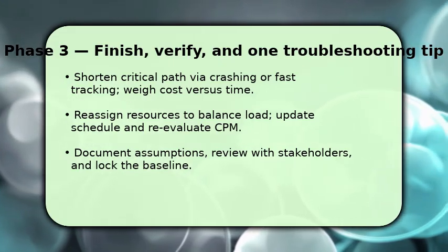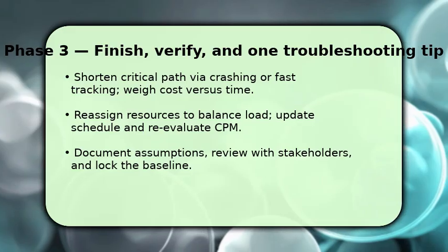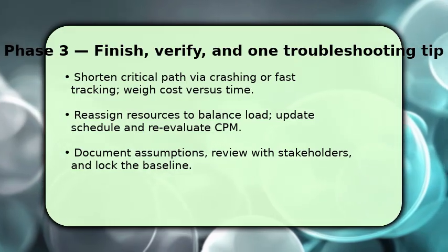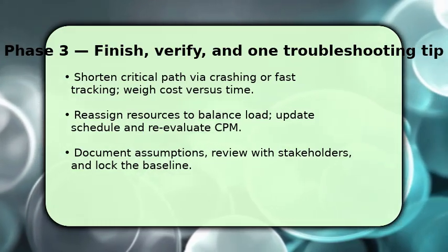Troubleshooting tip: if results look unstable, check for input errors. Wrong dependencies or mixed time units are the most common causes.